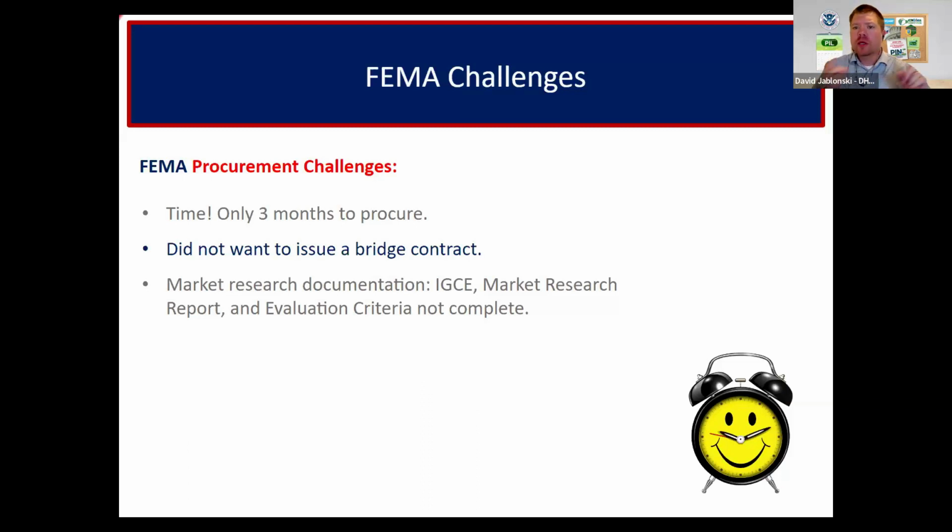All right, so back to this one, the challenges, right? They had only 3 months to get this done. They did not want to issue a bridge contract, and the market research documentation, the IGCE, market research report, and evaluation criteria, none of these were complete. So they had to get this done pretty quickly. Let's go to the next slide.